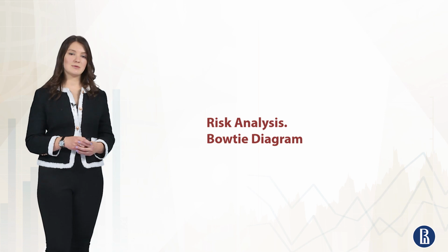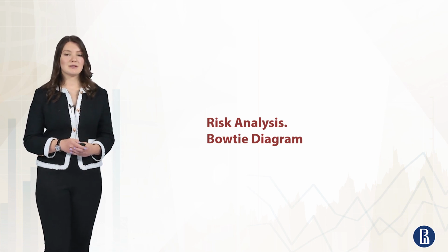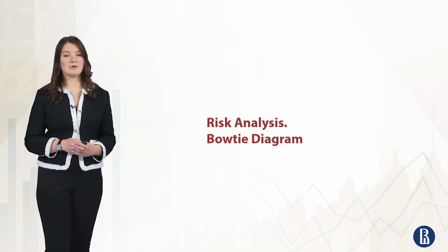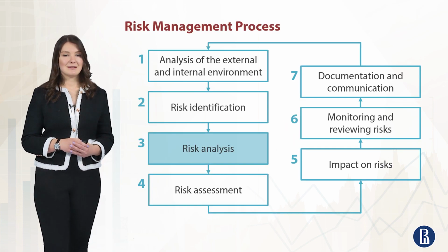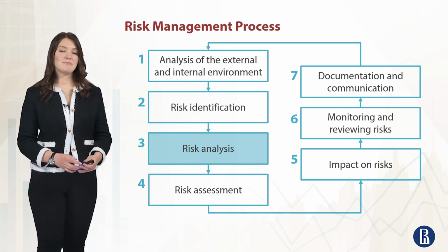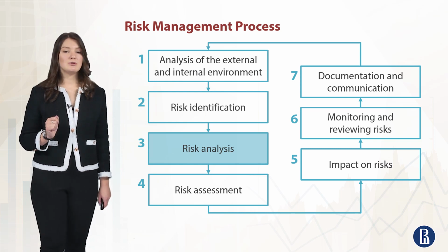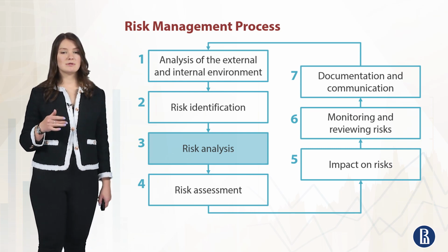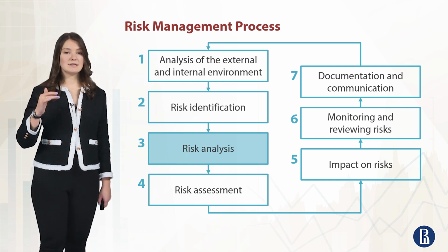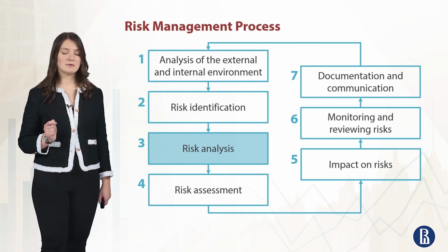During this lecture, we will study risk analysis, and we will see a very useful framework like the bow-tie diagram. Risk analysis is the third element of the risk management process. You should do it after the risk identification, when you have prepared the initial risk register and have the list of risks that were identified during the interview with experts.